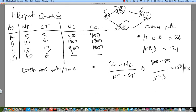And we will repeat that for each one of them. So let's try to do that. So this is $150 per day. Crash cost per unit time. This is $1,300 and then it's $300, so that's just $100. This one is $600 and three days, so that's $200 per day.